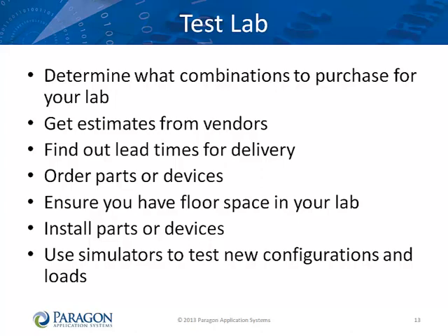We have been talking about upgrading or replacing terminals in production, but don't forget your test lab. Figure out what you really need in your lab for testing. You will not have the budget or the space for every make and model of terminal you would like to test with. You will also have to keep some terminals as magnetic stripe only for regression testing and production support.